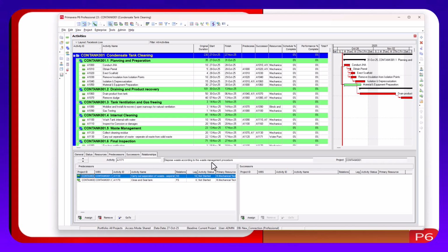It's good to imbibe. The next is lock down calendars before baseline. Make sure your calendars are properly set before you baseline. You would have checked your calendars, checked your schedule, and refreshed like I did to make sure the sequence is aligned, because your calendars can actually mess up what you've done earlier, especially when you did not start with that particular calendar, you brought it in along the line and weren't careful enough to set it up properly.